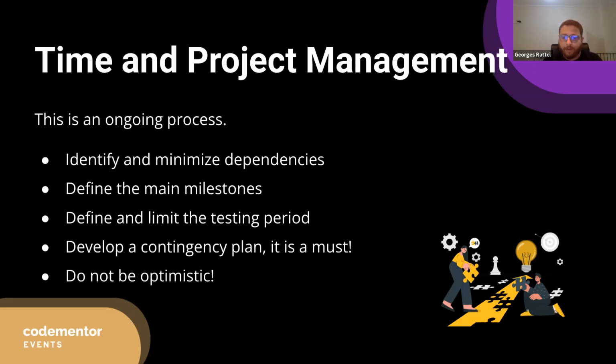Even if it goes down to just defining a mock API, just a mock structure that doesn't access the database or anything, just produces a static JSON structure, it's enough to untangle the dependency that happens between the front ender and the back ender.